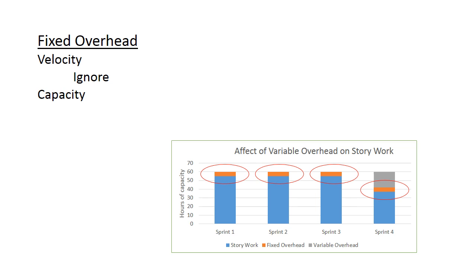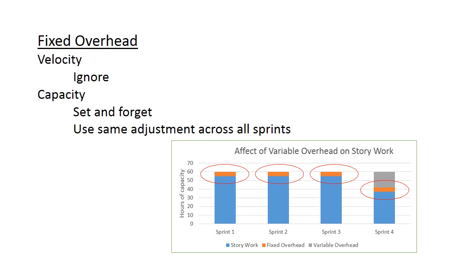For capacity, I recommend you initially adjust your capacity hours for these fixed overhead items, and then forget about it. The same adjustment will work across all sprints. If you've already set capacity at six hours of work per day per programmer, then you might just ignore the effects that fixed overhead have on capacity. I recommend you do not create stories and do not create tasks for any of the fixed overhead work — it's simply a waste of time, as it's already accounted for in the capacity.